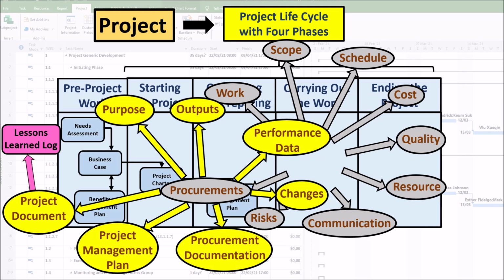The Lessons Learned log may be updated with 1. Information about challenges encountered during the procurement conduct process, as well as approaches that worked well and how they could have been avoided. 2. During the procurement control process, the Lessons Learned log may be updated with techniques that were effective in maintaining the scope, schedule, and cost of the items purchased. The log should show what corrective actions were taken to respond to variances that may have occurred and how effective they were. 3. If there are complaints, the information should be documented to prevent recurrences. Additional information on how to improve the procurement process may also be recorded.